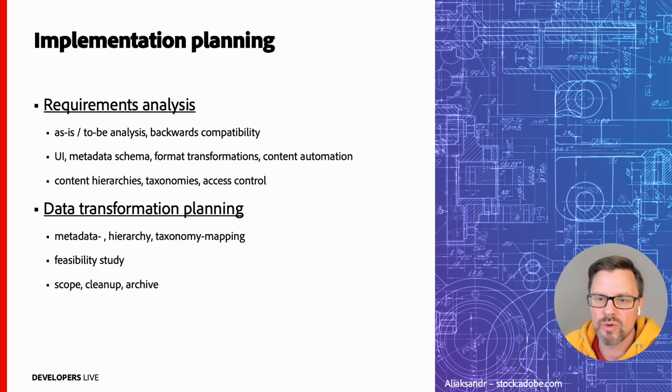A migration is also a good opportunity to get rid of data no longer in use or relevant. It's a good idea to incorporate a cleanup procedure in the technical migration. There is no point in migrating 10 terabytes of data and having business users delete half of it after the migration. Cleanup can happen either on the legacy system before migration or as part of delete list or delete rules fed into the transformation. For example, a rule could be do not migrate when creation date is older than X years, except when it's in folder Y.